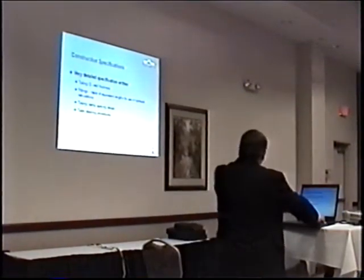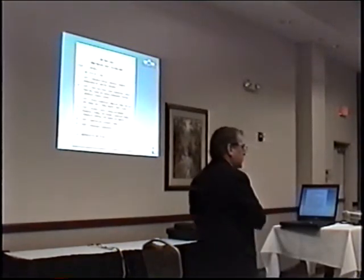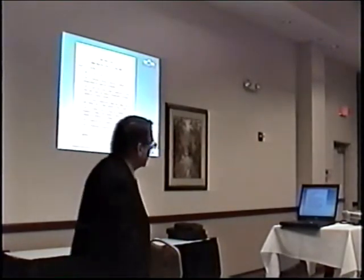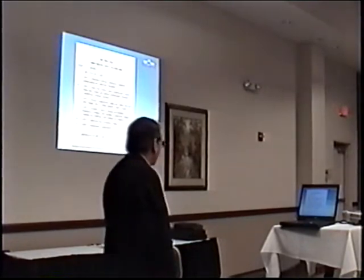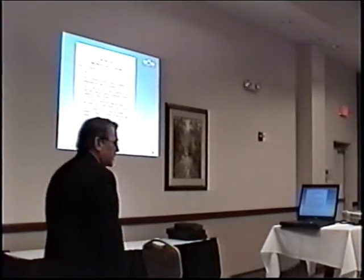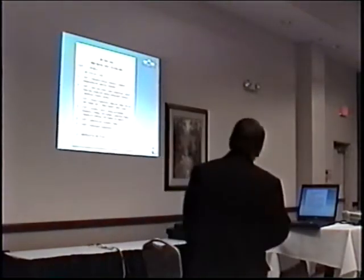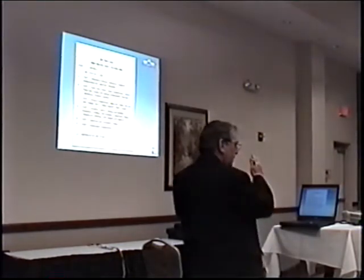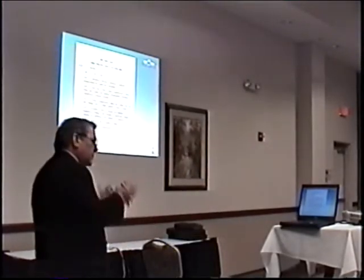Specifications. The sprinkler contractors who were going to install this job had no experience whatsoever with water mist systems. So I wrote a very in-depth and detailed specification to provide everything I thought they could possibly ever need in terms of knowing how to design the system. I put in all the water mist system design requirements. I put in tables of all the spacing. I basically reproduced your NFPA 13 and put it into the spec.